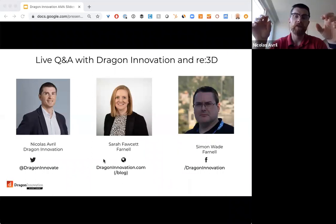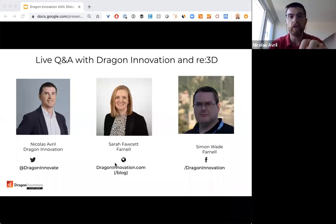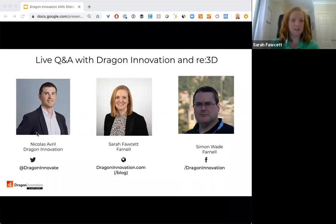And maybe to add to this is, when you're developing your product, when you're going to go to large volume mass production, you're going to most likely partner with a contract manufacturer. That contract manufacturer works with distributors. That's what you want to make sure. You don't have to deal and negotiate with the large suppliers and distributors yourself. You have a contract with a contract manufacturer, and you specify which chip, which component you want, and they source them from there. Yeah, but it's definitely a good question to ask in these uncertain times more than ever.